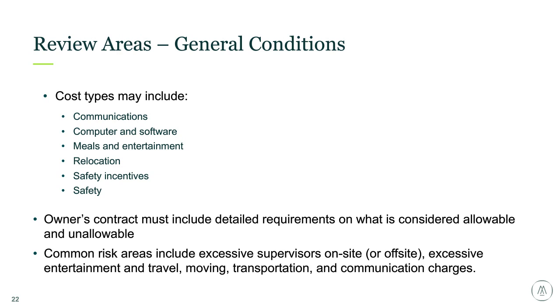And I've seen these types of charges get very excessive, like for entertainment, travel, moving, relocation. We recently had a job where they took the whole team, and the owner wasn't invited, to a baseball game, and it was a substantial amount of money. So having clear expectations around these types of charges is critical so that you're not getting charged for it.